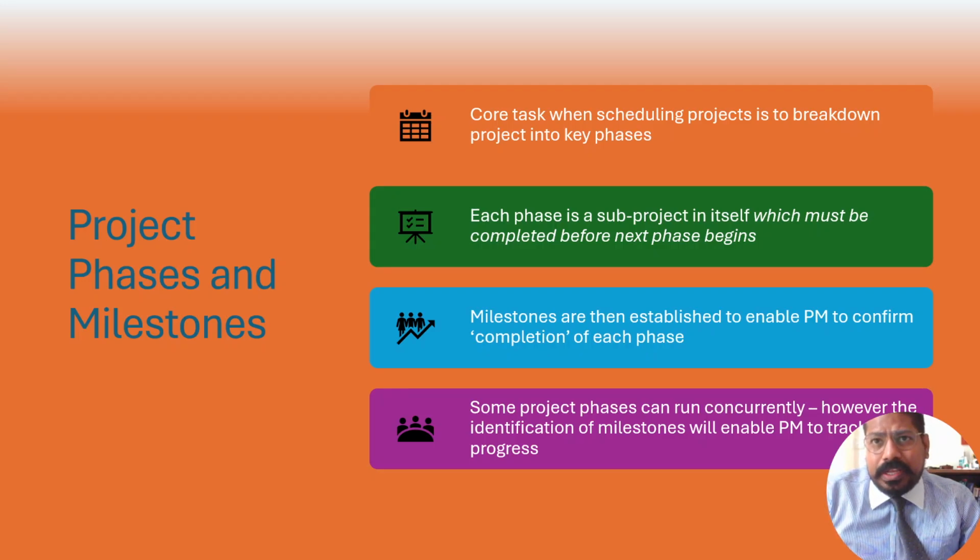The complete scope has to be divided in such a way that each WBS is quantifiable and manageable. It should not be so small that it becomes a mundane task just to keep track of those WBS, but it should not be so big that even one WBS is in itself a project. So a WBS has to be broken down in such a way that it is achievable, trackable, and manageable. Second point is there should not be any repetition of WBS activities, because in that case you will find two people working on the same task. Also, it will give a sense of confusion and ambiguity. So the work breakdown structure has to be divided in such a way.